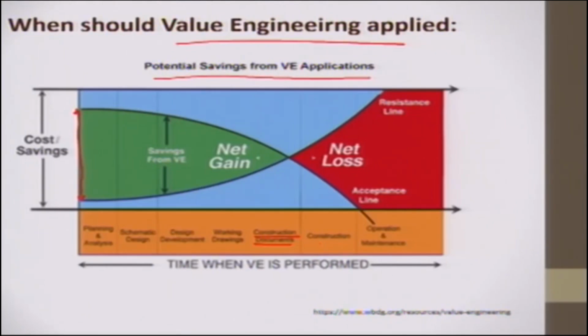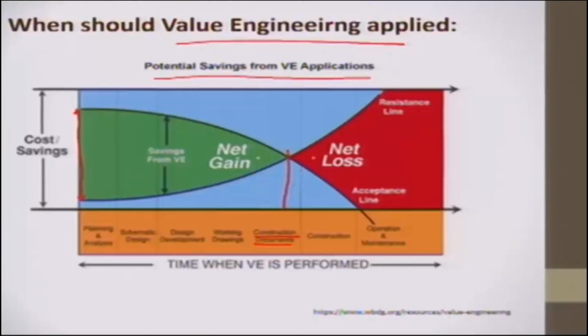If value engineering is applied when the construction is going to start, at this point even the construction hasn't started, then what would happen? Sometimes value engineering brings a total transformation of the plans. The replanning, redesigning, redocumentation, all those things have to be carried out. And when the construction starts, all the resources are gathered, and therefore we will have loss here. And if some of the construction has been carried out, then there will be total loss. We need to demolish the building and rebuild again.